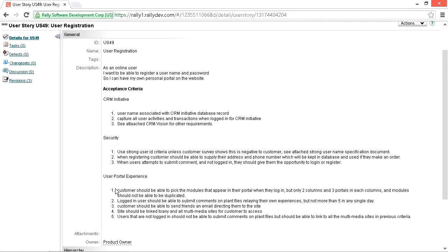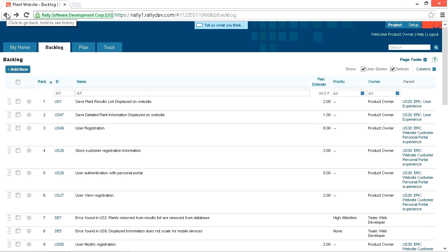Lastly, the team is solely responsible for estimating the level of effort. The product owner says what will be delivered by maintaining and prioritizing the product backlog. But the team says how much effort each product backlog item will take to implement. The E in the INVEST guidelines stands for estimable. The feature or requirement described in the user story and its acceptance criteria must be clearly understood by the team in order for them to give an accurate estimate of effort.